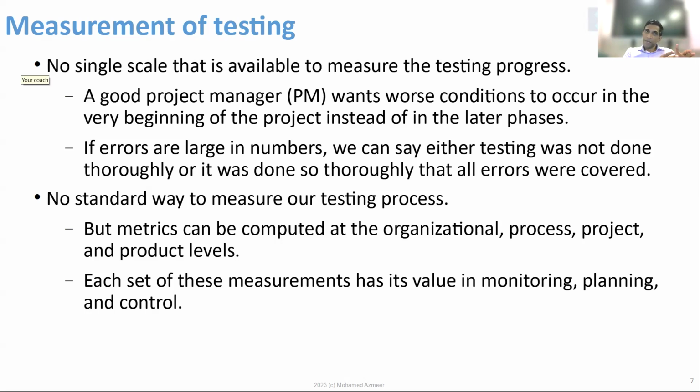If you can't find the problem in the early stage, it gets to the next stage. When it goes from stage 1 to stage 2, it also actually amplifies. So remember, money wise, effort wise, it amplifies. So $1 worth of testing in phase 1 might be $10 in the next phase. 1 hour of fixing might become 1 day of fixing in the next phase. So a good project manager wants to find everything as early as possible, right?